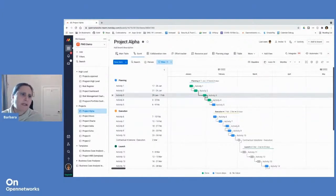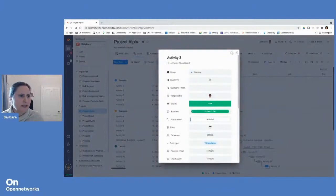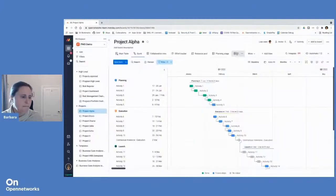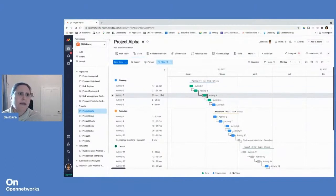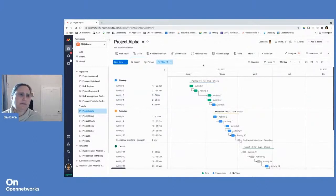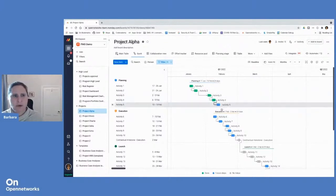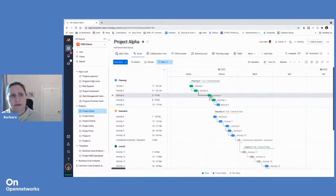I can actually click in to enter the activity and edit something here if I need to. And I can also move an activity along, which will kick off an automation and move all the dependencies, all the other activities that are dependent on that activity.